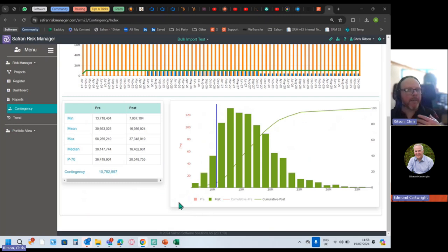So that's implying that you guys out there, all 300 of you that are on my project, you are all going to be doing your mitigations, right? Because actually, as it stands, this is not looking great. I'm getting like P5. I have 5% confidence that this contingency is sufficient to get us to the end of the project. I'm ringing my alarm bell when I see that.